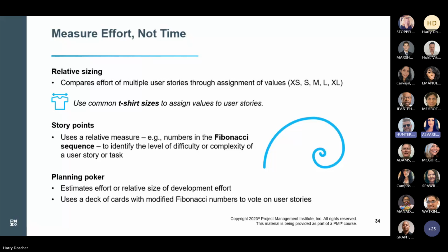And as each of the stories or each of the features is brought up, those people who are doing the estimates determine how they see the size of the effort, relative to a baseline, like a 1-day effort or a half-day effort.